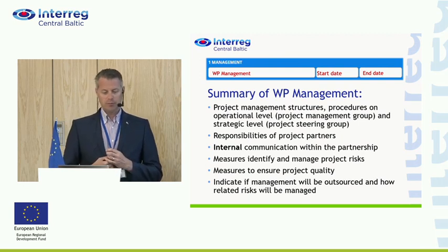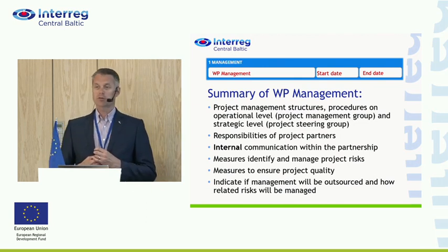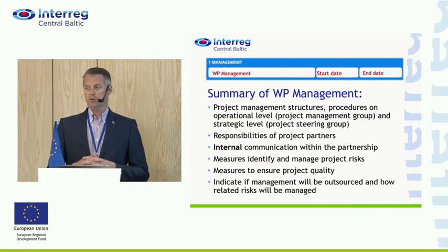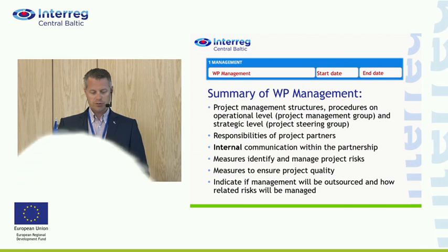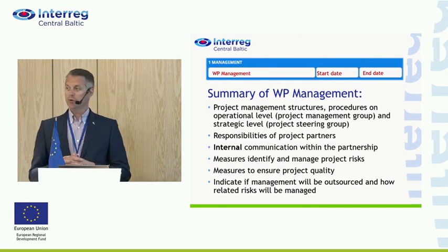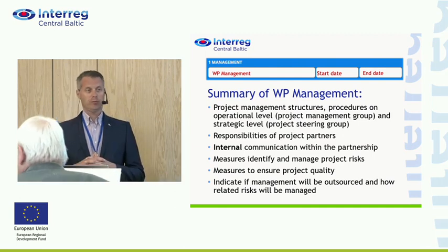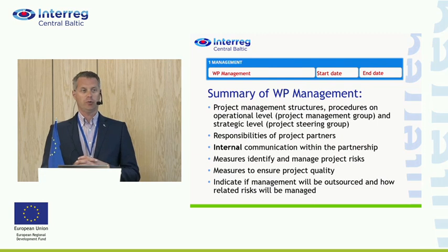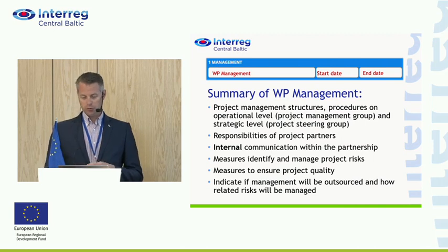In some cases, the project partners have planned to externalize project management, so there is a procured project manager from outside of the lead partner organization who does the project management as an outside resource. If you plan this, then let us know, and also the possible risks related to this kind of procedure. This is generally not recommended, but we have had it in a few projects, and we have some successful examples of this, so it's not ruled out.